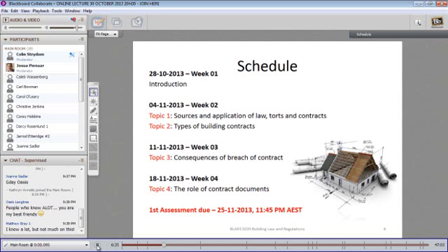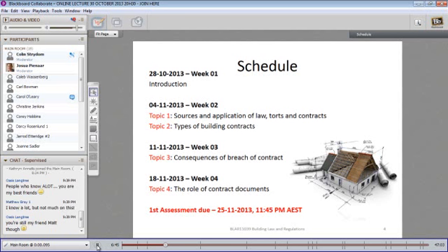The other ones that we always quickly, briefly touch on, and I'm sure there's plenty more, would be construction management contracts, and cost plus contracts, where the actual cost of the project will be taken and a specific percentage is added as a sort of profit to the contractor.